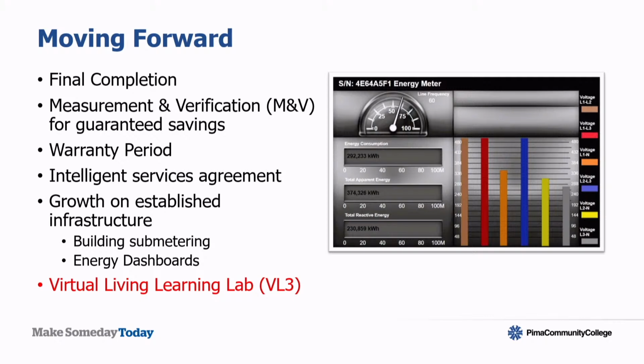All right, so steps moving forward. As was mentioned, we are at substantial completion, and there were 23 components of the contract. Each one had its own substantial completion. They've all been signed off. So that's going to lead to final acceptance of the contract. Final acceptance will be Trane has done what the contract has reflected, and we can then release their final payment and performance retention. That will be $1,446,535 going forward on that.